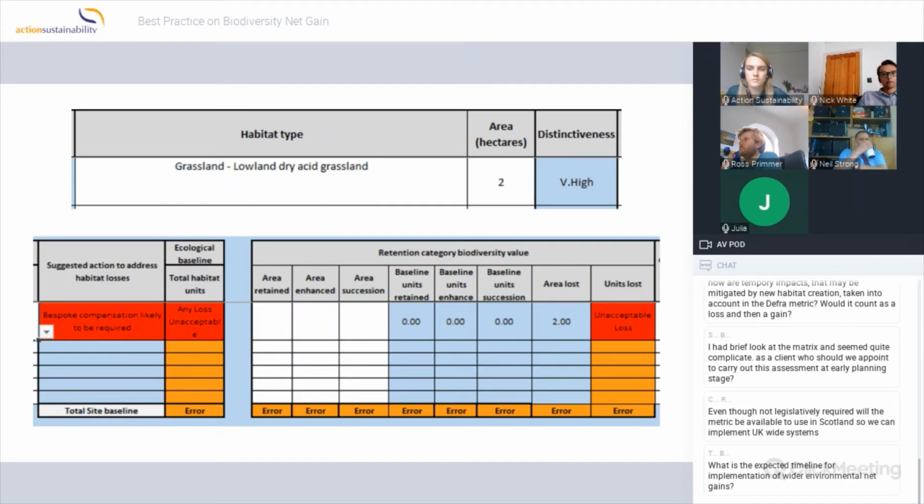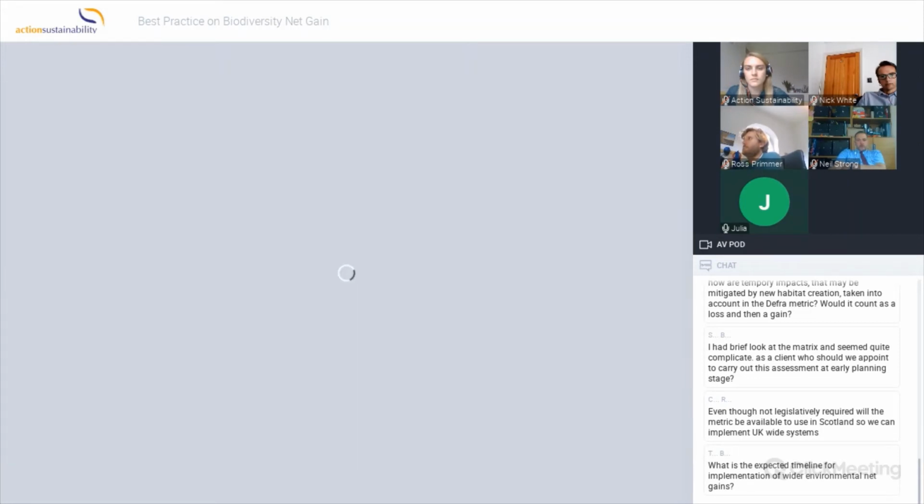And to get over that, you have to click a box that says you've achieved bespoke compensation. Now, I've used this at a very early stage, and the developer actually avoided that habitat because he didn't want that. His version of bespoke compensation was time and cost through that conversation and discussion with Natural England and the local authority. So because I showed that to him early, we were early enough in the process to really change his design. So the metric is invaluable in that sense.